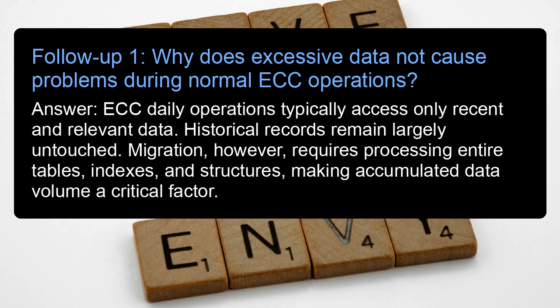Answer: ECC daily operations typically access only recent and relevant data. Historical records remain largely untouched. Migration, however, requires processing entire tables, indexes, and structures, making accumulated data volume a critical factor.